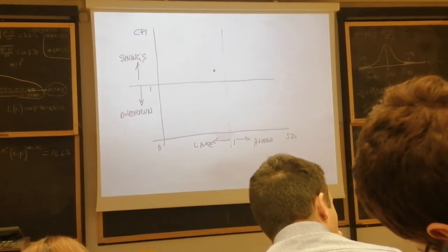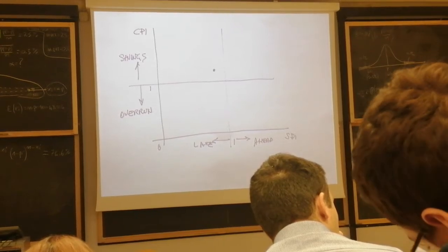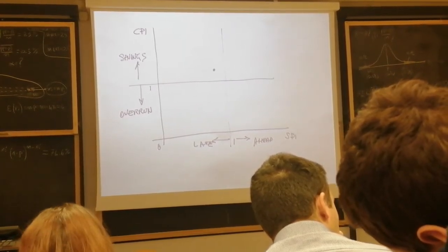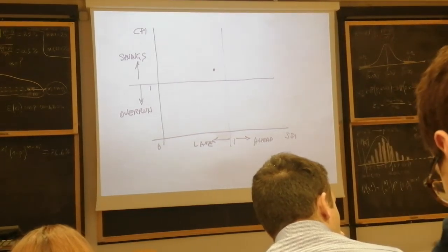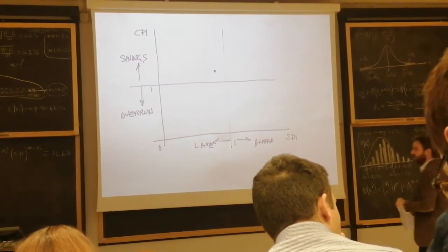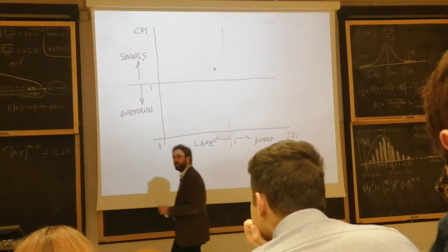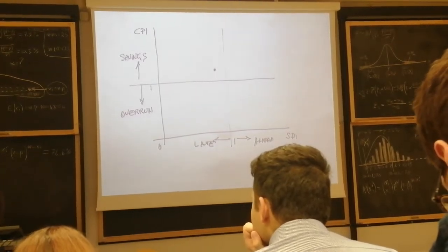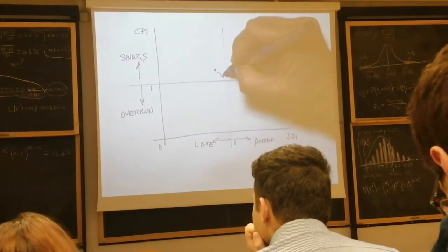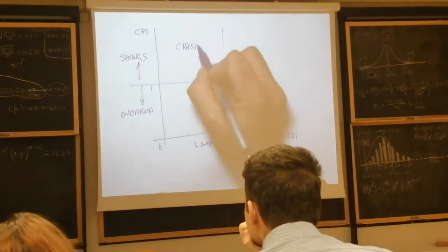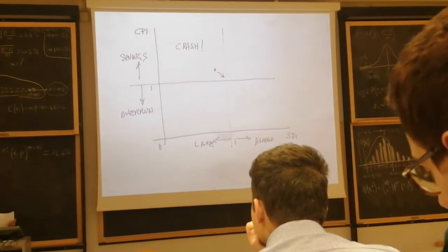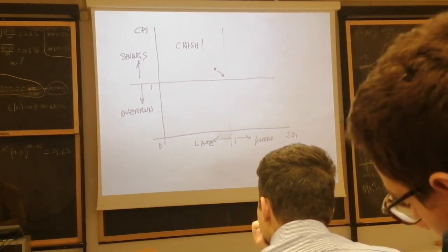So just go away, you're very inexperienced, I just get those guys that work much faster, but they are more expensive. So they're senior instead of junior. That's the control action I can make, so that in a later stage my project could be converted back to original expectations.